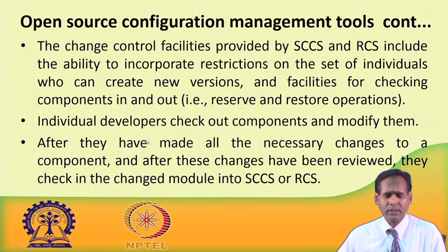Individual developers check out the components and modify them. Then after they have made all the necessary changes to a component, and after all the changes have been reviewed and approved by the CCB, they can check the changed module back into SCCS and RCS, and the master file is replaced with this changed module.